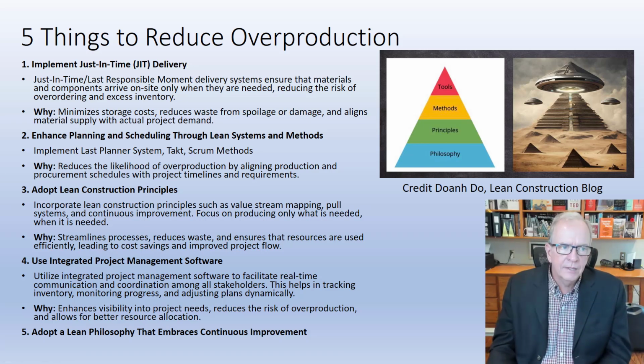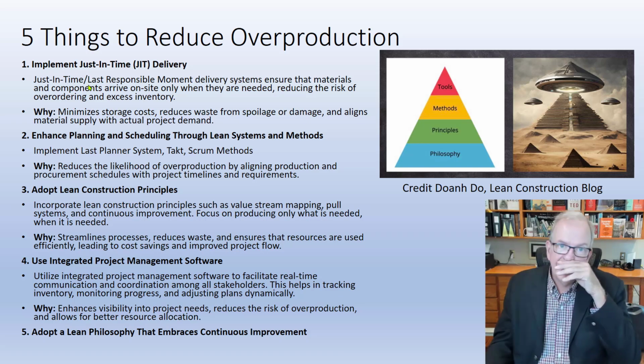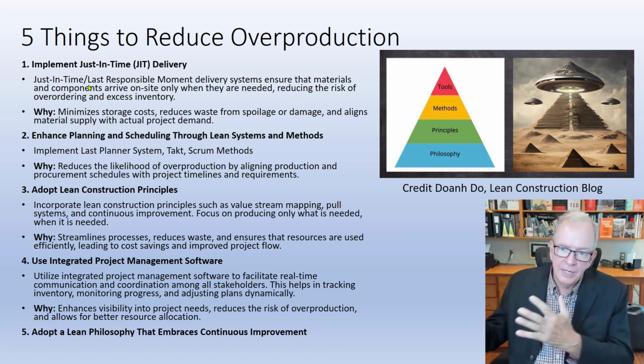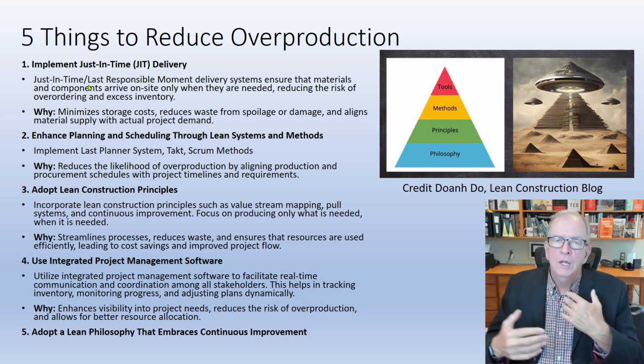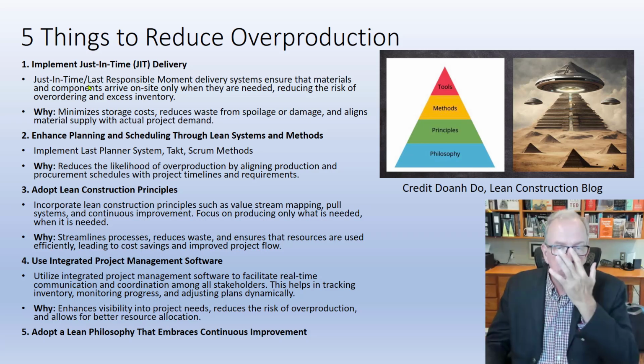All right, so let's think a little bit about this video here, where we're talking about overproduction, the second area of waste. Just-in-time delivery. I said I'd come back to this from the first or second slide. I like the term last responsible moment in construction, just because I think just-in-time puts people off sometimes. I don't think it should, because its true intention is to try to get things to the project close to when you need it, at the appropriate amount that you need.